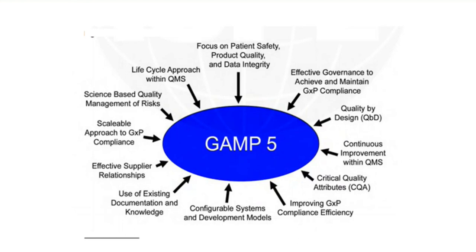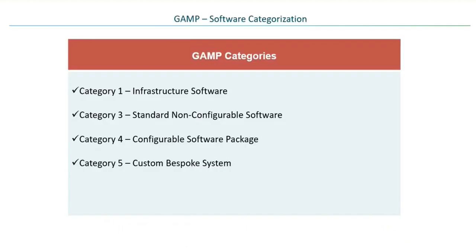An impact analysis of the change should be performed, and there should be a CAB, change advisory board, who will approve the change, and there is a partner who will develop the change and test the change, and then it goes for the release. So this is the entire cycle that will be followed across the entire life cycle of the system. And then the last phase is the retirement of the system, which is the sunset. So this is how they have structured the entire process around any IT systems that are supporting the business process for producing a drug.